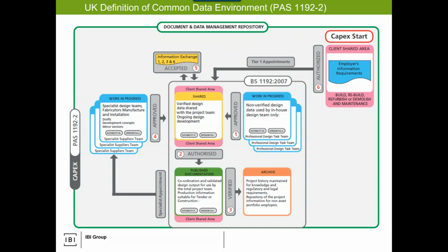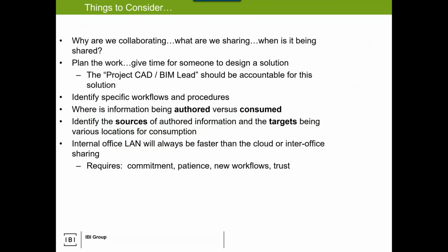Well, I don't want to do that based on a structural engineer and architect playing with a Revit model. I want to do that based on something that's deemed appropriate. I might even wait until something's published saying these are the signed off, completed foundation drawings. I will then go dig and start pouring the footings, because once I pour, good luck having me move the footing, right? So that's the mindset upon which this sort of workflow is built.